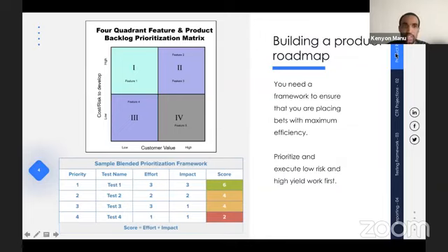But suffice it to say that having this matrix and or chart is a really good way for you to look at, talk through and summarize, so you make sure that you get your highest priority items done first. So if you go through feature one, you see in that box those are the things that are high risk to develop and low customer value. So you have to look at that and say, what should I be building here?